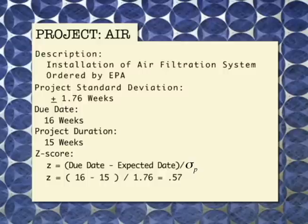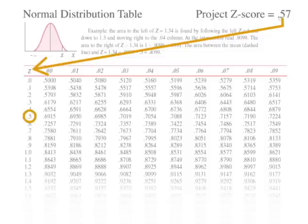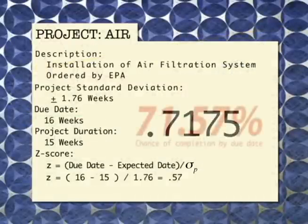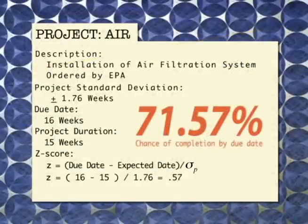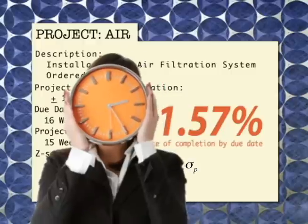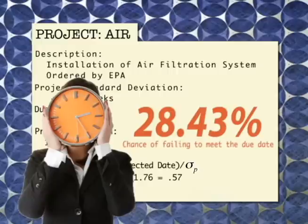What does that mean? It doesn't mean anything until you use a normal distribution table. On a normal distribution table, you find 0.5 on the left-hand side and 0.07 across the top — where they meet is 0.7157. What that means is that there's a 71.57% probability that you will finish this project by the 16th week. You should be worried, and your boss should be worried, because that also means you have over a 28% probability of not being finished on time.